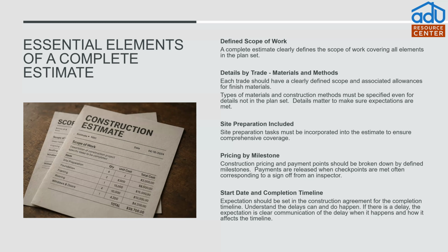The other thing we have to be mindful of is you haven't ordered your building materials yet for the next phase. That's going to come out of the payment that you pay them for the existing milestone. So imagine there may be 10 milestones. Every time you pay them for what they just did, they take that money, they pay their crew, they order your materials for the next phase, and it could be days before the product arrives. And you're going to go, hey, these guys are not here. What's going on? Well, they're waiting on the building materials to arrive. So multiply that by 10 milestones or 10 inspections, and you could say, well, gee, this has taken longer than I'd hoped.